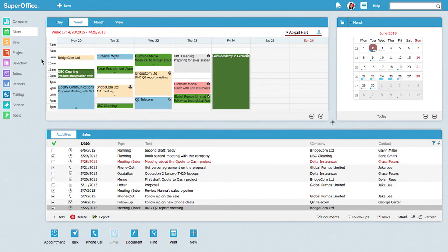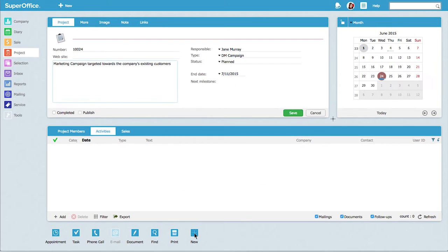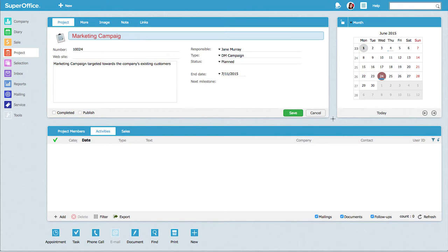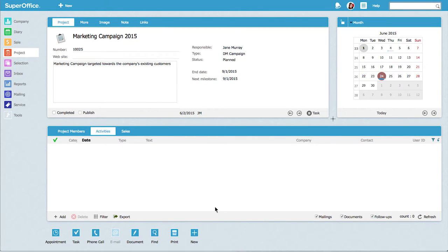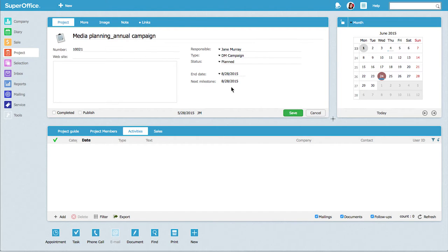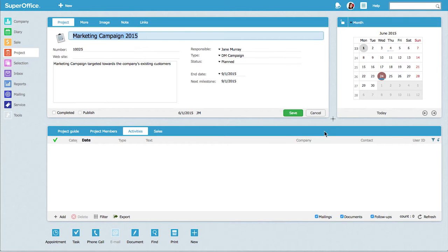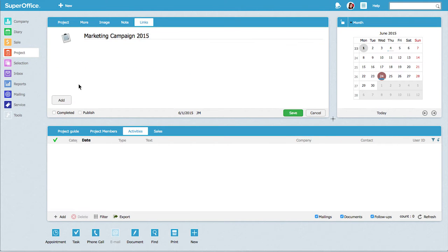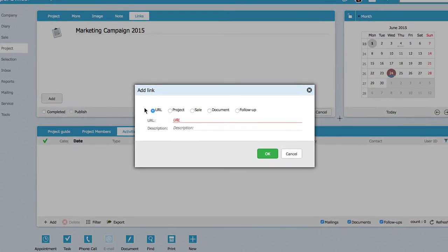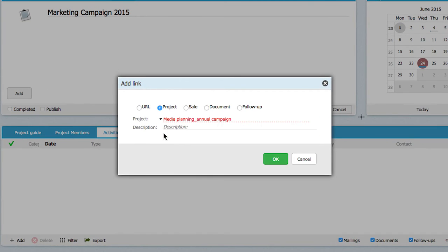The first thing Jane does is to create her main project for the campaign. Then she creates a number of sub-projects. Finally, she links these projects together so that everything related to the launch campaign is easy to find. In this way, she gets full control of the project.